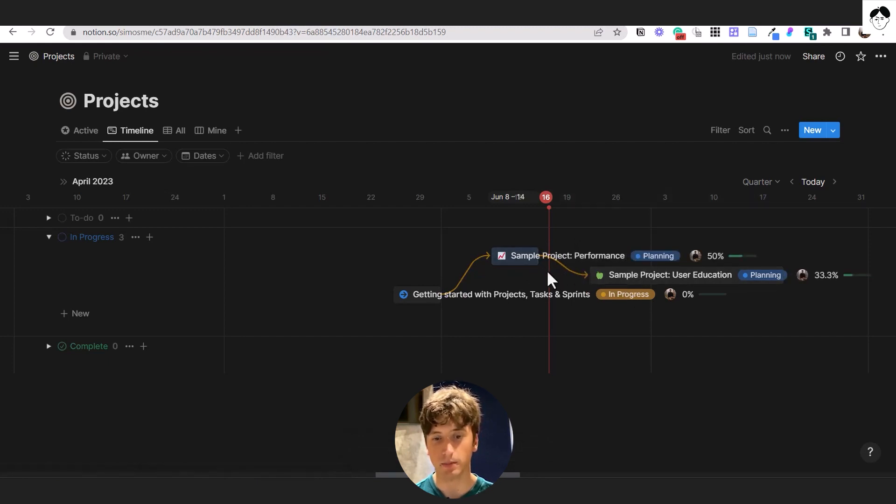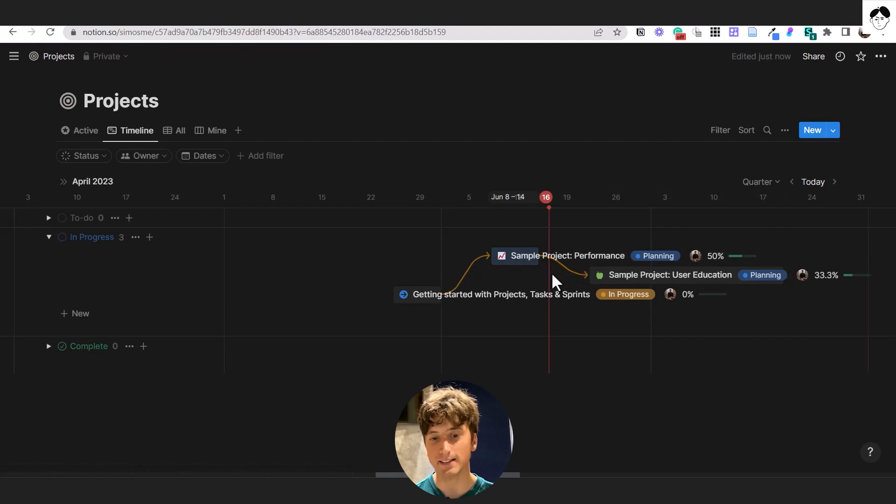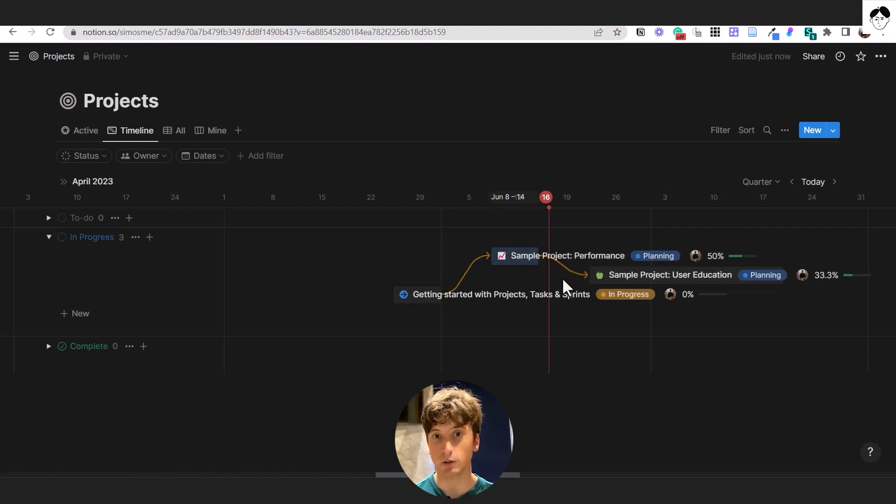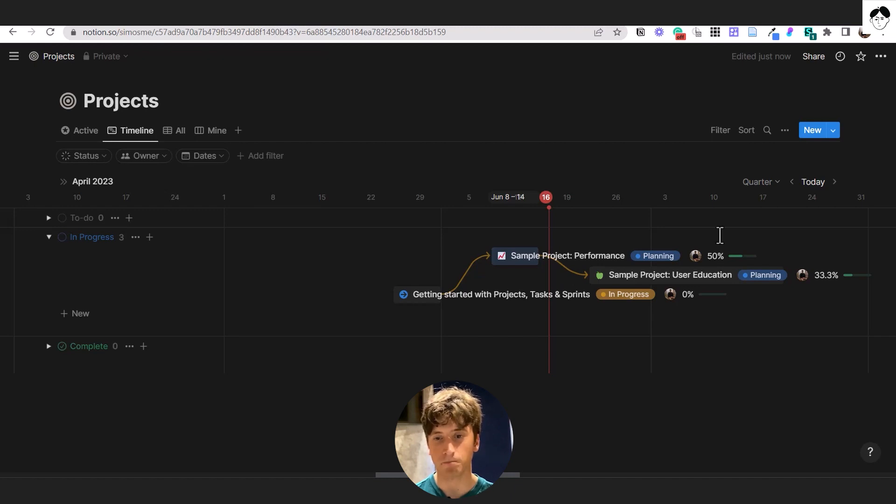And the lag time between those projects, meaning how many days there are between these two projects is going to remain exactly the same once the date is shifted forward. And that's how things work. And how the new dependencies feature can allow you to automatically shift dates.